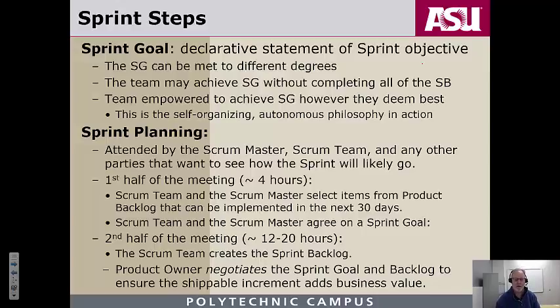So you have a product backlog where some of the items deal with a database, and some of the other items deal with user experience. Some deal with some kind of application logic. You kind of know where your resources are for that particular sprint or the next few sprints. You also know that you can't build certain screens in the user interface until certain database tables are available, because they provide the data to fill in the screens. So you may want to do things in an order that's slightly different than the business priorities set by the product owner.